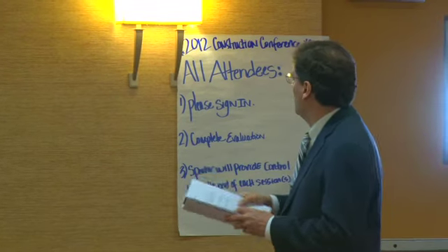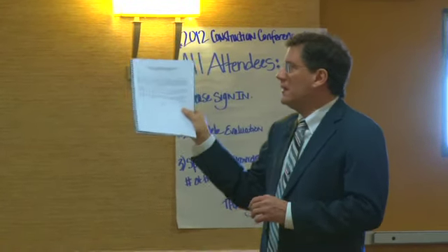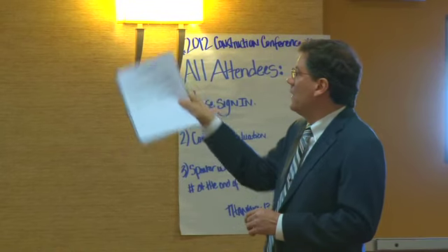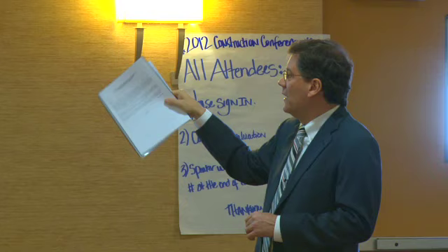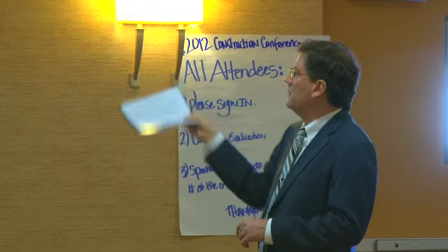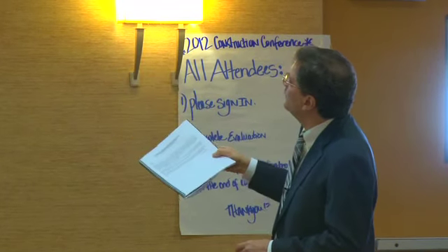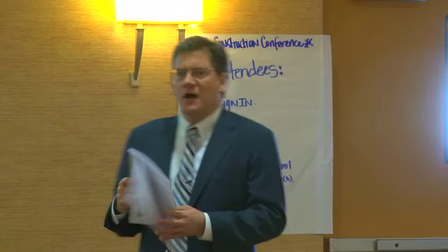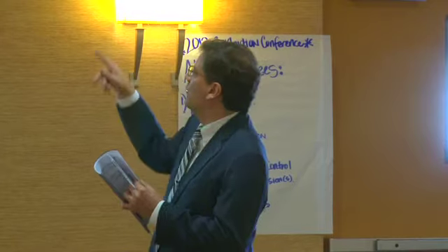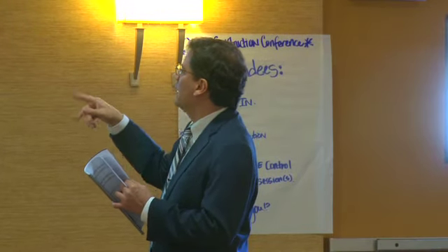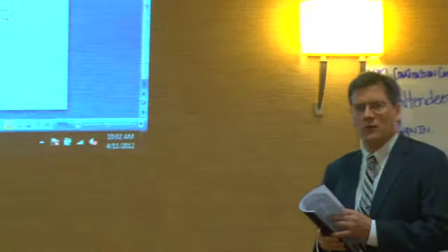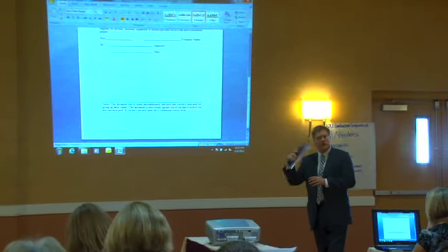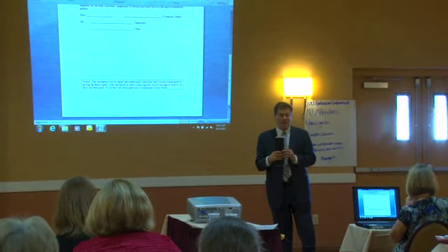Oh, okay. So the bottom line is, feel free to modify if you need to, and if you look at the bottom language there, again, this is the death penalty. Is this unconditional? This is conditional. On the unconditional waiver and release, can you pull up real quick? On the unconditional waiver and release, it's got that block language. Same thing. Don't sign this unless you've been paid in full.